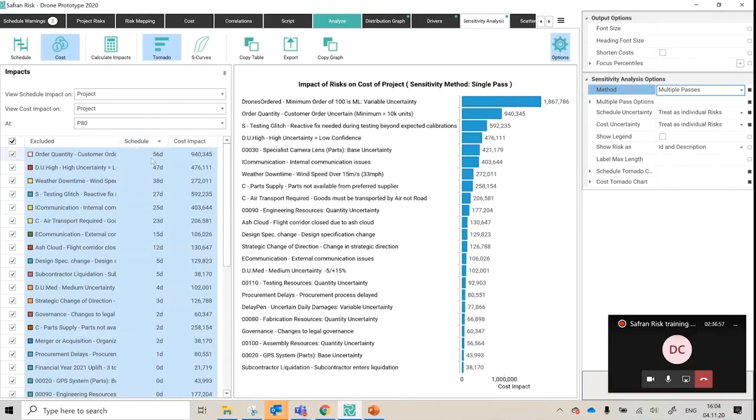It then understands which order to remove the risks in, rather than in a random order. It will now take them off in this particular order, and then re-simulate a new 2000 iteration Monte Carlo on top of that, which helps refine and increase the accuracy of the output, which means that all of the P80 values, if you were to sum them together, should total closer to the actual cumulative P80 that you see on the original output.